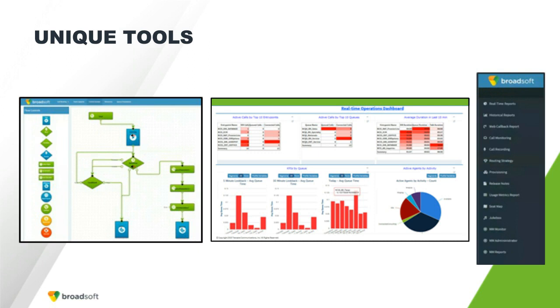And the second thing that's important, as David mentioned, is analytics. Obviously the contact center or the business has been running prior to the migration, and you want to ensure that you continue to have visibility after the migration. In order to provide that bridge from the premise world to the cloud world, it requires a set of analytics and tools where you can pull data from existing systems, and likely from a variety of existing systems, aggregate that data up and provide that for historical analysis, but then also provide real-time dashboards and real-time visualizations so that you can manage the existing intraday operations and make sure that the cutover and the migration is progressing as designed.